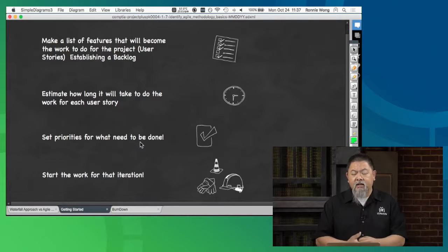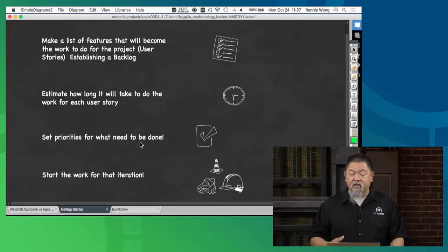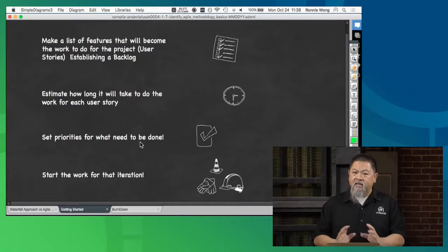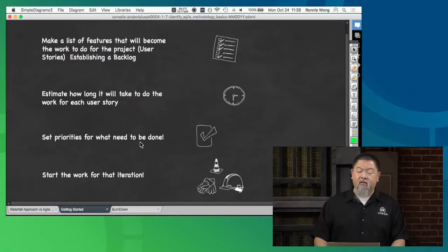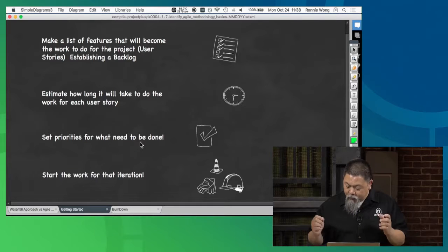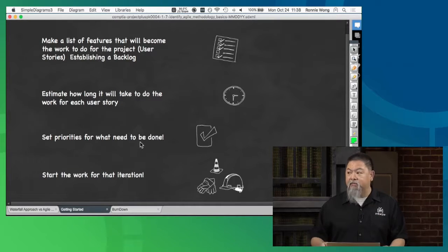So here for the planning, you do need to understand the outputs that are actually going to be expected from your sprint. So normally we set up a sprint goal at the very beginning. Okay, what are we actually expecting to be achieved during our particular 2-week sprint? Now, when I say that, you might list out a paragraph of things, but what you want for your team is this. You want them to be able to give a 1 to 2 sentence summary of what your team goal is going to be for that sprint.